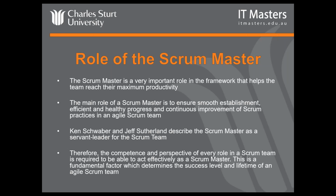Guy, I'm just going to jump in and answer this question about quality. Sure. So David's asked a question, which I will read out. Quality is very subjective. I agree with you. In Agile and specifically in Scrum, it's all about working software. So if the software is working and my product owner is happy with it, then we're done. And we use things, as I said, definition of done is like a checklist of activities that is done by the teams, David, to ensure that what they produce is truly done in terms of quality. I hope that answers that question.